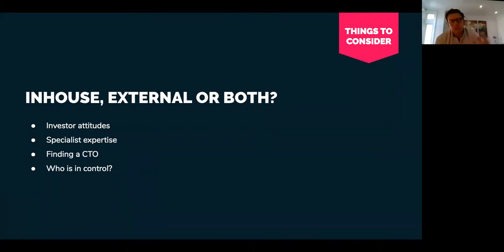Then there are big advantages. It's not just that there was no other option. A CTO, generally speaking, will go on payroll, right? So that's a headcount cost we have to cover. With an external partner, we can do it on a project basis. Okay, build this, and I know that there's that amount of money, and then we can try and get people using that, and then we can go and get more investment. So it's mildly slower, but it's much back to flexibility. Mindwave is a resource that we can turn off. That's helpful for a startup without much money.